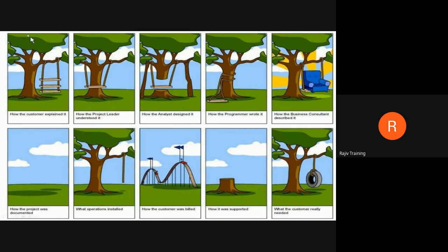In this case, if you had called the customer in 2 weeks itself, the customer would have corrected you. No, no, I don't want this product. This is not what I told. What I wanted is something else. Maybe he would have reiterated, maybe put it in a different way to convey that this is what he wanted, right? Which means even though we have lost 2 weeks, we have still saved 5.5 months, right?